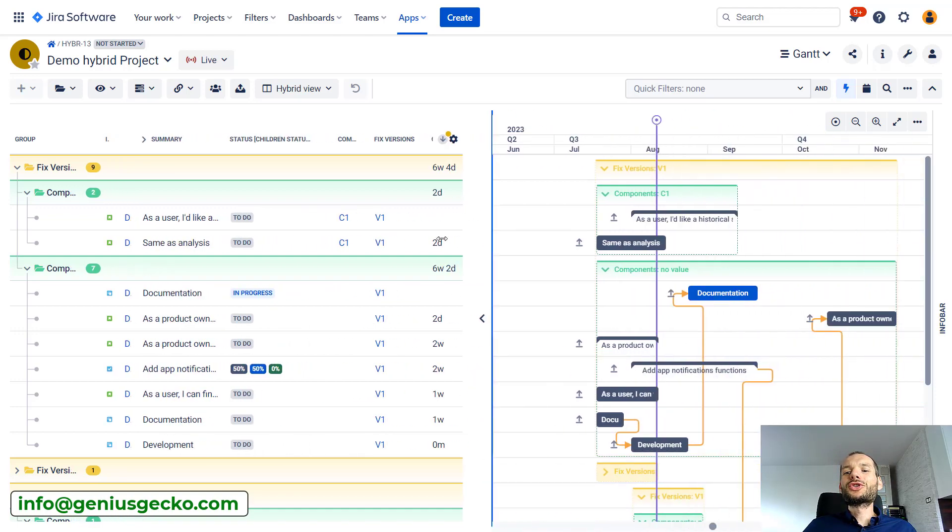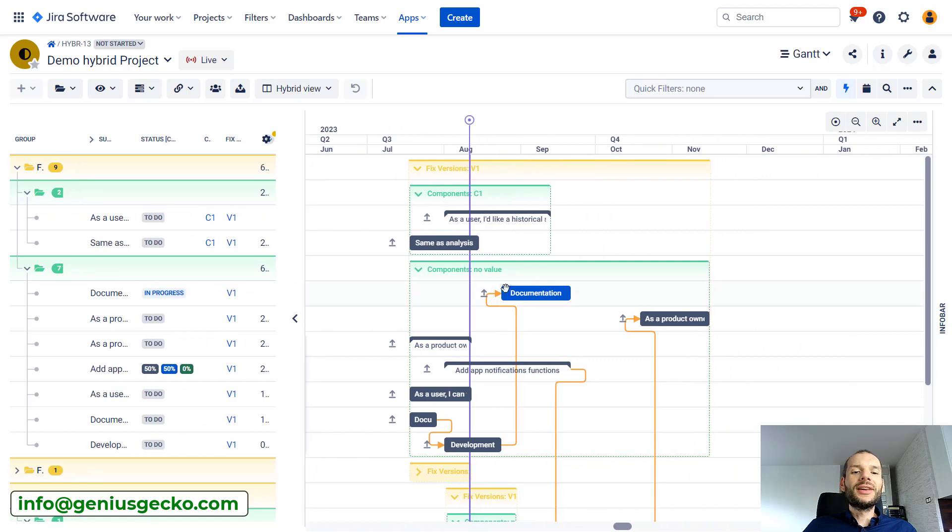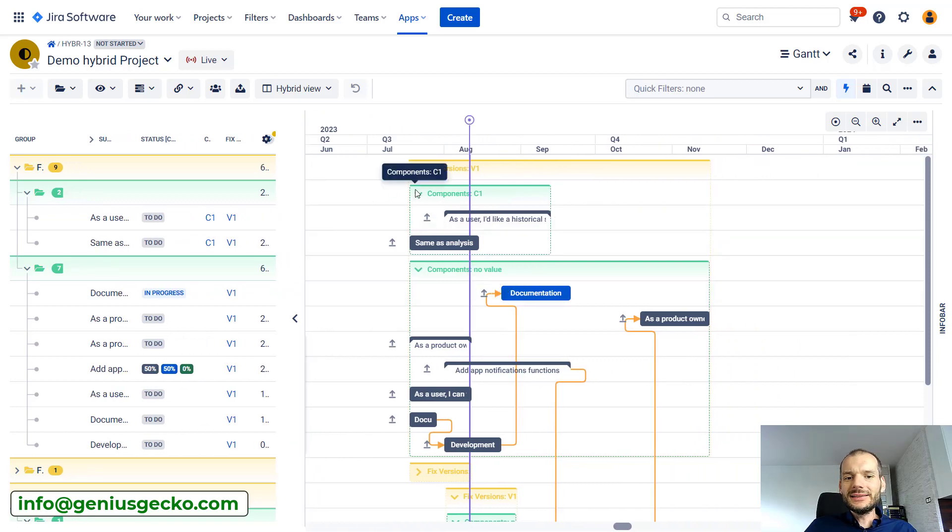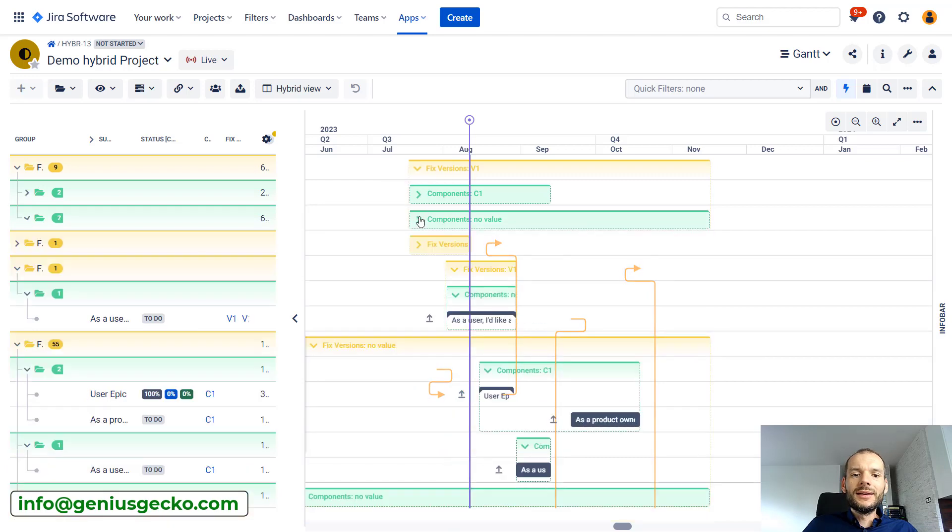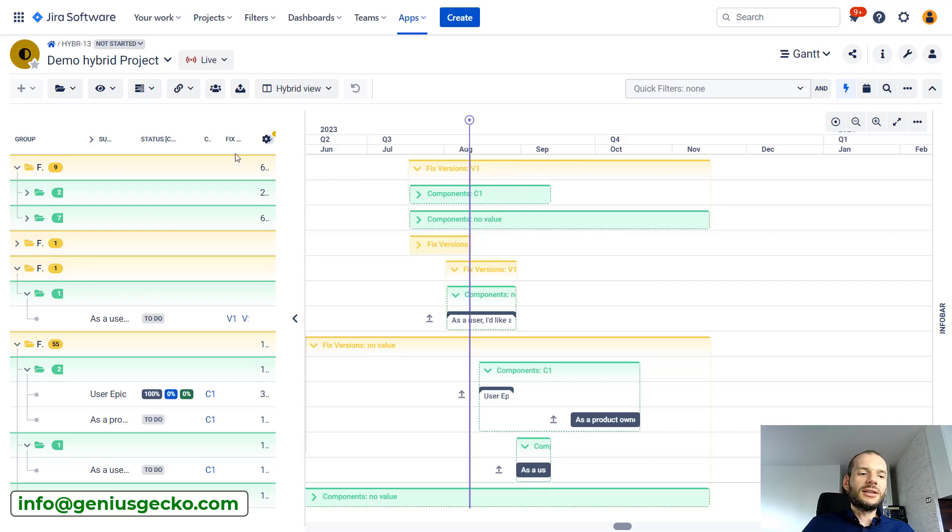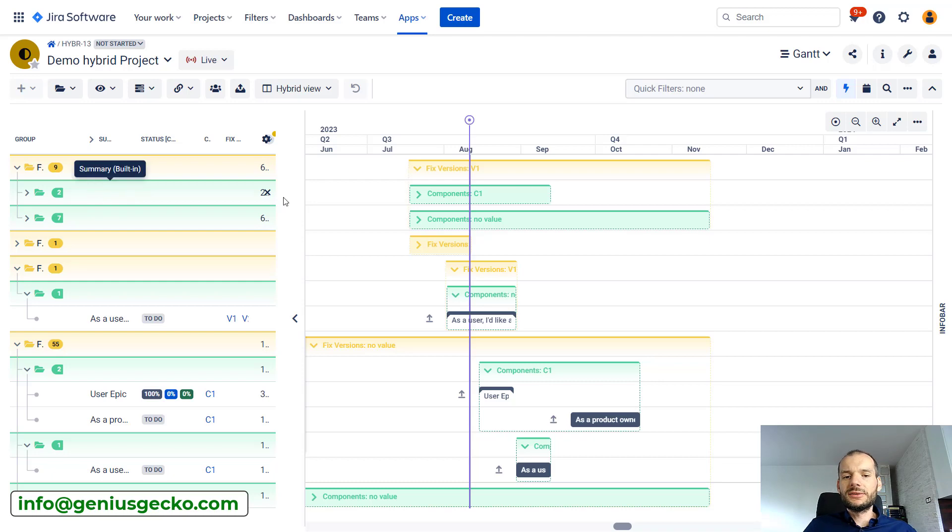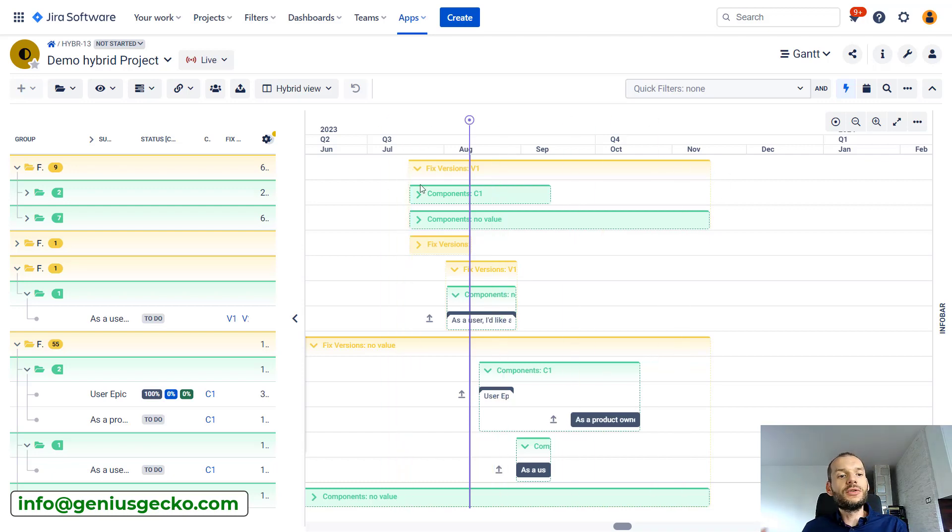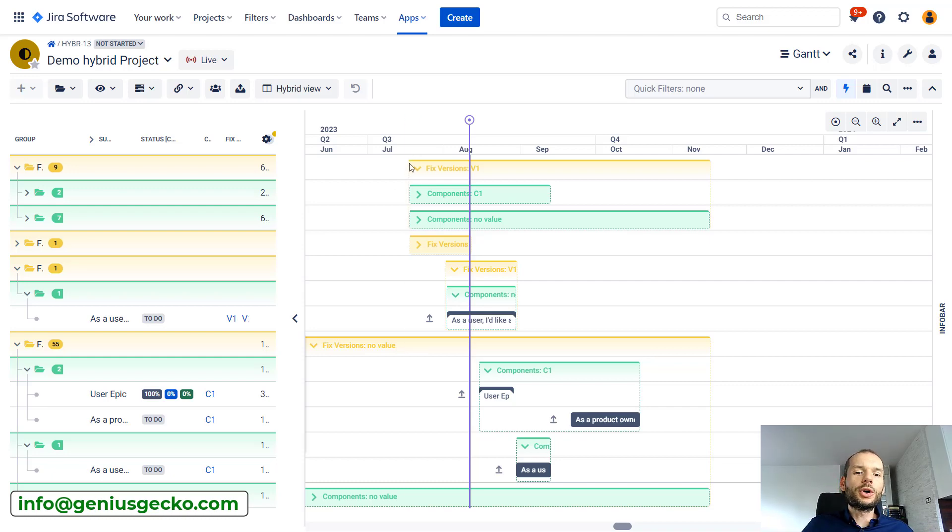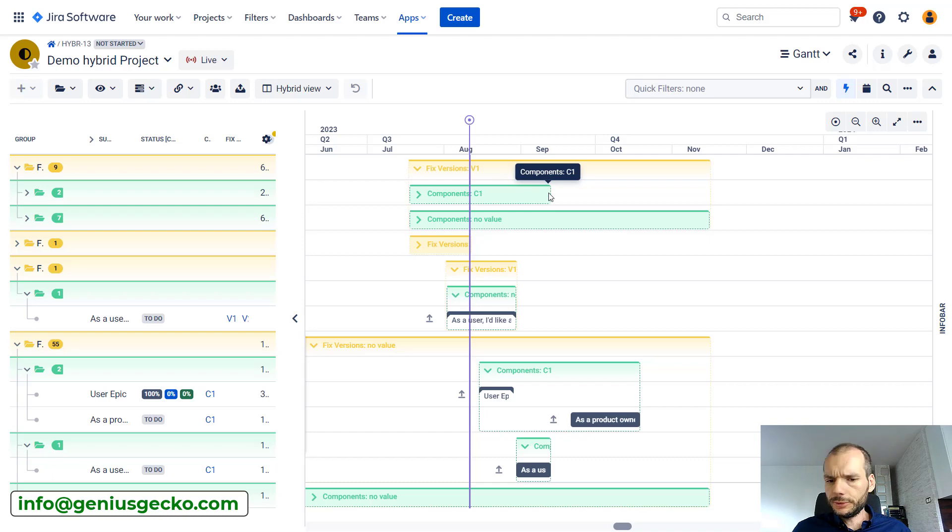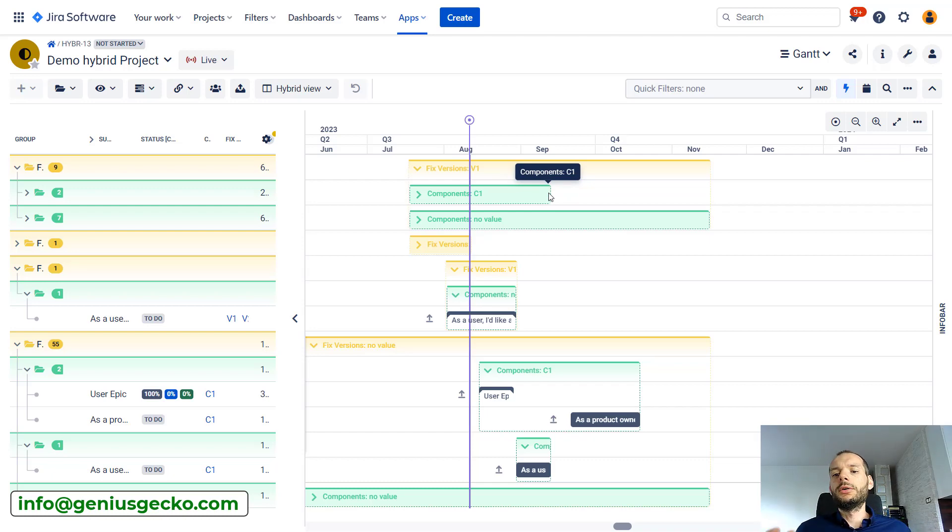The second use case is actually on the Gantt chart itself, on the Gantt diagram. You can see that on the Gantt diagram we also have these new boxes. Not only were our tasks grouped on the left side, on the list of the tasks, they were also grouped on the Gantt chart. Now we can see where on the timeline work on fixed version v1 is currently planned. We know where the work on fixed version one starts, where it ends. The same goes for component. Component is involved till the middle of September, so it gives us a pretty nice overview of where specific things can be delivered.